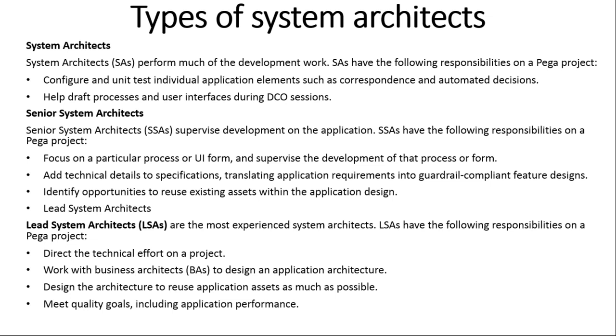And when the sprint starts, from the product backlog we will be taking the user stories based on the capacity of the team. For example, in a team we may have 3 developers, or 5, or 10 developers. The sprint is only 2 weeks.